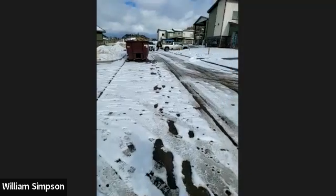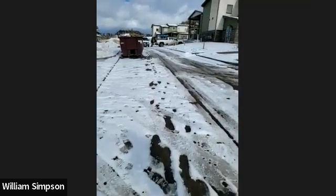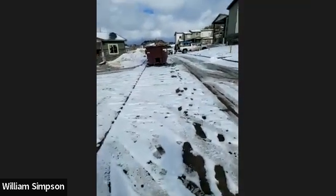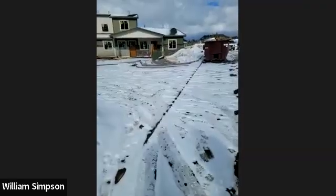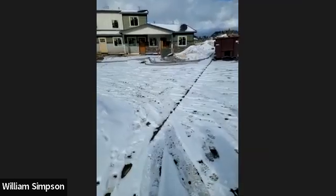So I'll put it down here like 4:30 for now. Yeah, that's probably a better date. We might be able to get the buildings done, but until I can get in and get all this concrete, because these buildings, you can't even access them without concrete. Right. So that's gonna be the trick, is just seeing what we get winter wise the next month or two. Okay, so concrete is your critical path.